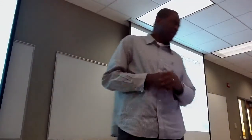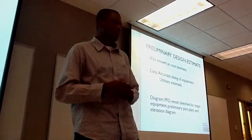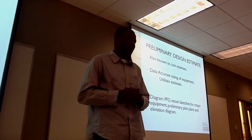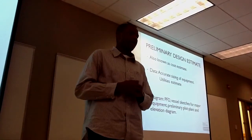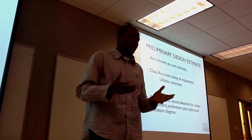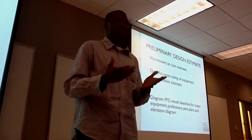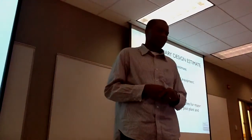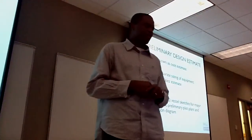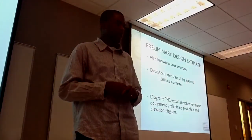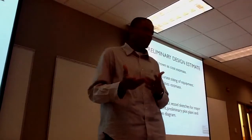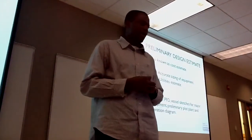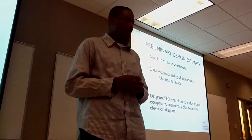The preliminary design estimate is also known as the cost estimate. The data required includes accurate sizing of the equipment involved in the plant and the utility estimate. The diagrams required are the process flow diagram, vessel sketches for major equipment, and a preliminary plant layout and elevation diagram.